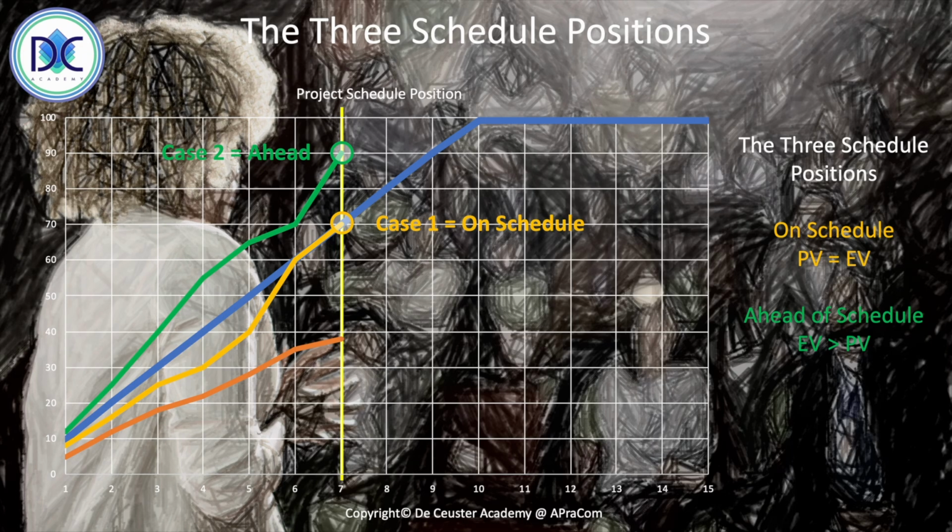But here you have to remember what we spoke about in the first lesson. If we do the work faster, we're also using the money faster. We will be going through our budget faster. And it's very important to report these things and have the financial people adjust your budget, because you're going faster. It means you will be able to create a project faster, which may mean that there is a significant financial advantage.